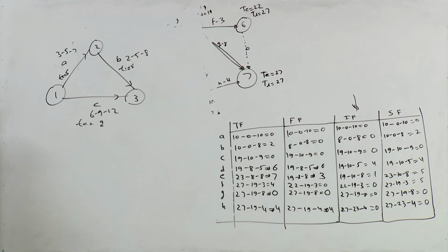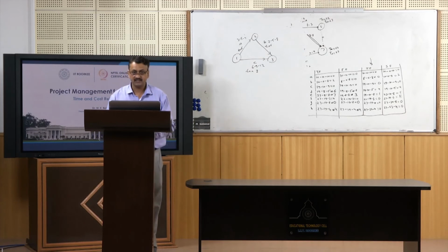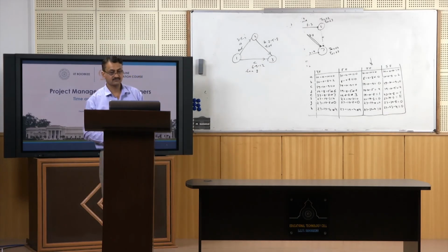So this is another drawback, right? As I said, activity generally takes beta distribution, but if it does not take beta distribution, then you will have a problem, right? And if the situation is uncertain, then it is good to simulate duration of the activity.